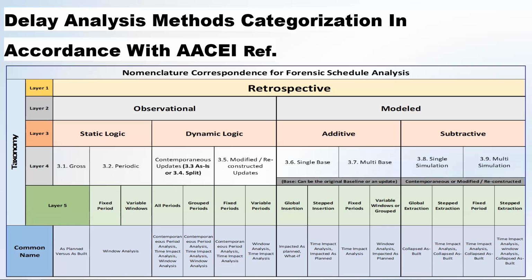In the additive, we have the single base, which is the impact as planned. We have one schedule and we put multiple fragments inside this schedule and monitor the dominant delay event and the dominant critical path. The multiple base is the window analysis. We insert the fragments in steps.